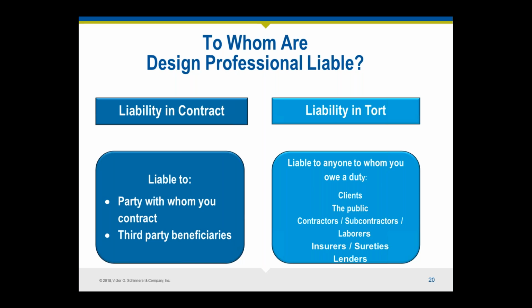I think honestly it doesn't really matter that much about that, because either the contractor can make a claim directly against you for things like delays and extra costs, or if they're not allowed in that state, they would make the claim against the owner, saying we were delayed and we had extra costs and it was all because of the design professionals. The drawings were ambiguous or were wrong, and there were delays in the way they responded to us on RFIs, and therefore we want them to pay these damages. And the owner would just turn around to the design professional and make the claim that way, so it would flow down to you.